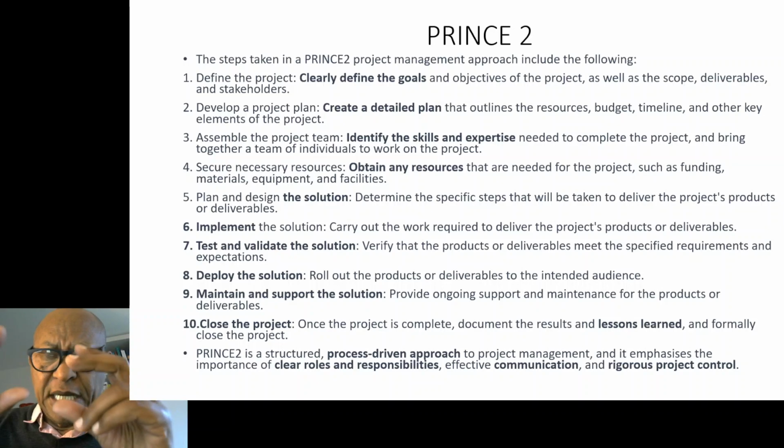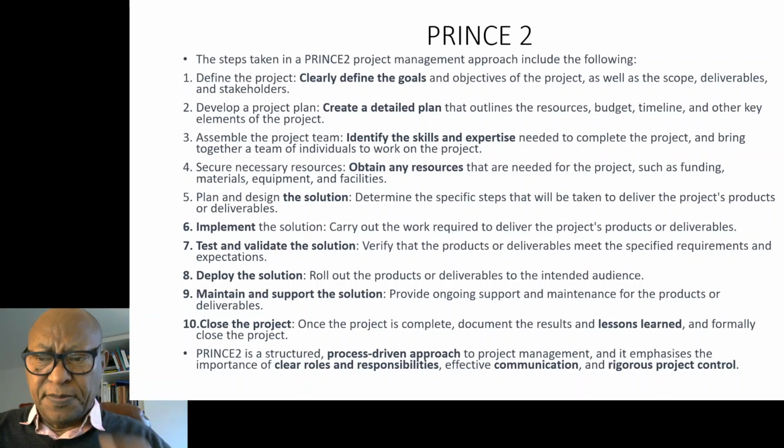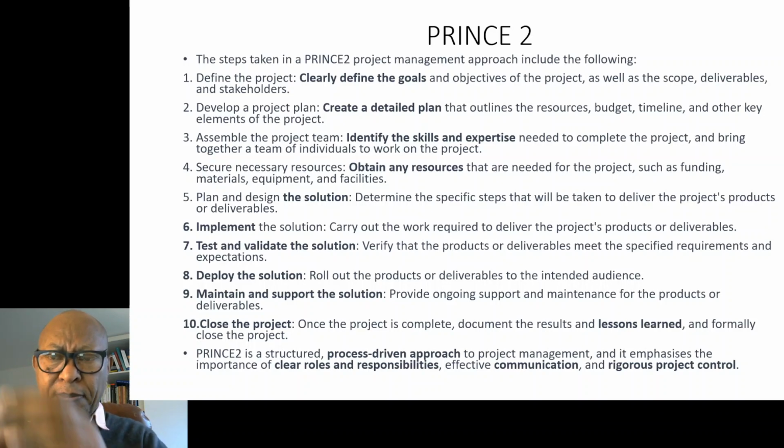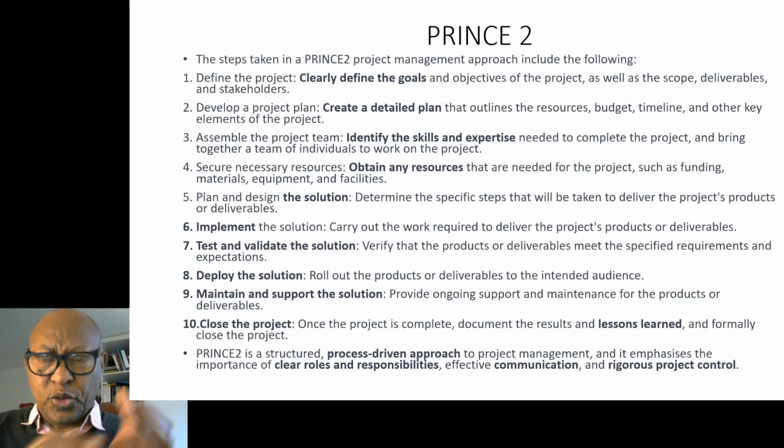When a product is produced, it has parts, and all these parts are broken down. It is a top-down approach of breaking down products, and the work breakdown structure is the approach that starts from the bottom-up, where each element starts building what kinds of work need to be done. That work package will be created for a team or for an individual to complete.